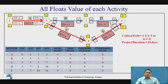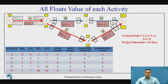For the independent float of activity A, EST of the succeeding activity is 3, and since there is no preceding activity, LFT is taken as 0. So independent float = 3 minus 0 minus 3 = 0. The interfering float is total float minus free float = 0 minus 0 = 0. Activity A has all floats equal to 0, confirming it is a critical activity that must start and finish as defined.